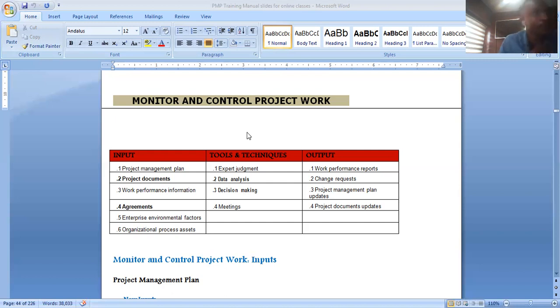You must define that when you have a plan. He knows from your plan that when you get to the field in a place where you discover that something is leaking, and you want to, I'm just giving you an instance, you don't have to call me. Use your discretion, but write it down. That this is what we did. Write it down. Then I will look at it. But for major changes like this that would affect the budget, 10%, 30%, 20%, don't, even if it's beautiful, don't execute it. Stop.